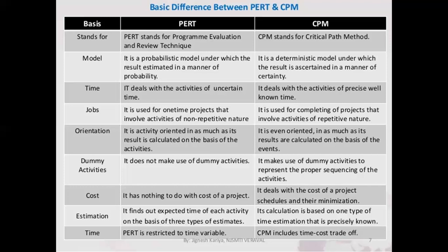So the CPM method is used in projects where we have the precise time duration of each and every activity, whereas the PERT technique is used where you cannot know the exact time duration of each and every activity. Generally, in research and development cases, you don't know the time. It depends upon keen observation. It may take some days together, some months together, like that, to complete a project.